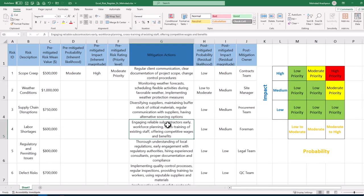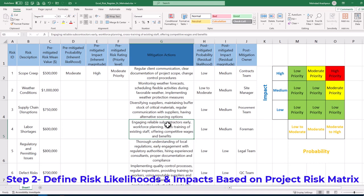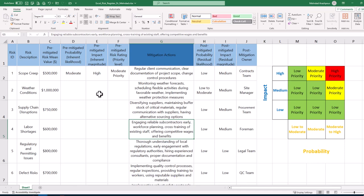This concludes the first step in building the project risk register in Excel. Step 2 is to define risk likelihoods and impacts based on the project risk matrix. We start with restricting the type of data that can be entered into the range of cells related to the pre-mitigated probability. This can be done using data validation feature of Excel to maintain data accuracy, consistency and integrity.